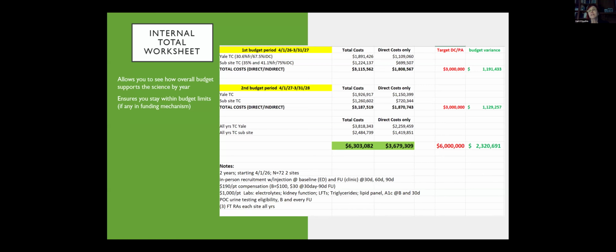it's the whole thing that happens, even when people go out on leave, you're really not supposed to say anything like that. Someone goes out on leave, you have to pay them. Whatever leave it is, whether it's a child leave or a sickness or someone in their family, it's very legitimate, but you have to pay for that. The government's not going to say, oh, by the way, I know you had a couple of people on medical leave, I'm going to give you a lot of extra thousand. No way. You have to come up with it.